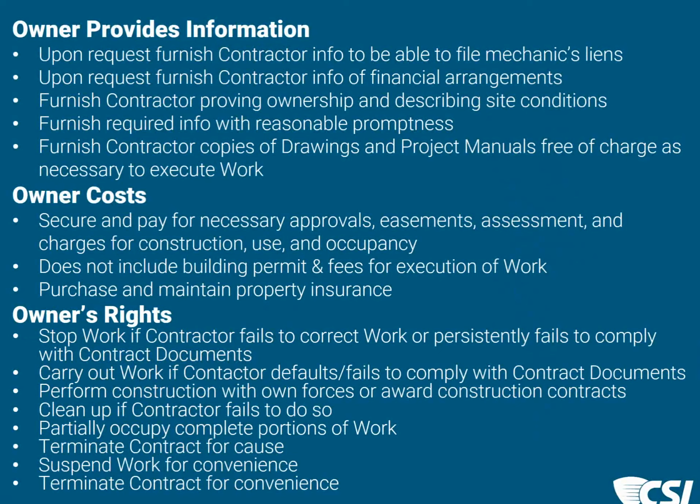They also have the right to carry out work if the contractor isn't performing in compliance with the contract documents, whether that means bringing in their own forces to perform some part of the construction, or awarding subsequent construction contracts to other contractors to have that work performed. They have the right to do so. These are not things that are simply undertaken, and they demand a great deal of thought and contemplation before they're ever done, but the owner has that right.